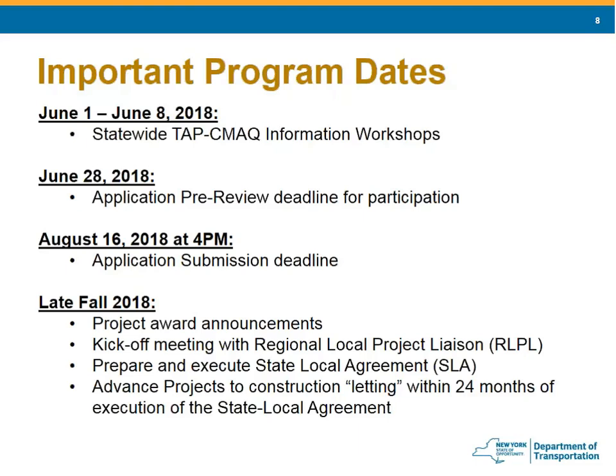The next slide covers important dates. June 1st to June 8th — we're right in the middle of that now, going around doing webinars and workshops. June 28th is the application pre-review deadline. It's worth five points. August 16th at 4 p.m. is the hard application submission deadline. After we receive applications, they'll be scored and reviewed, and in late fall we'll announce the project award winners. There will then be a kickoff meeting with your regional local project liaison.